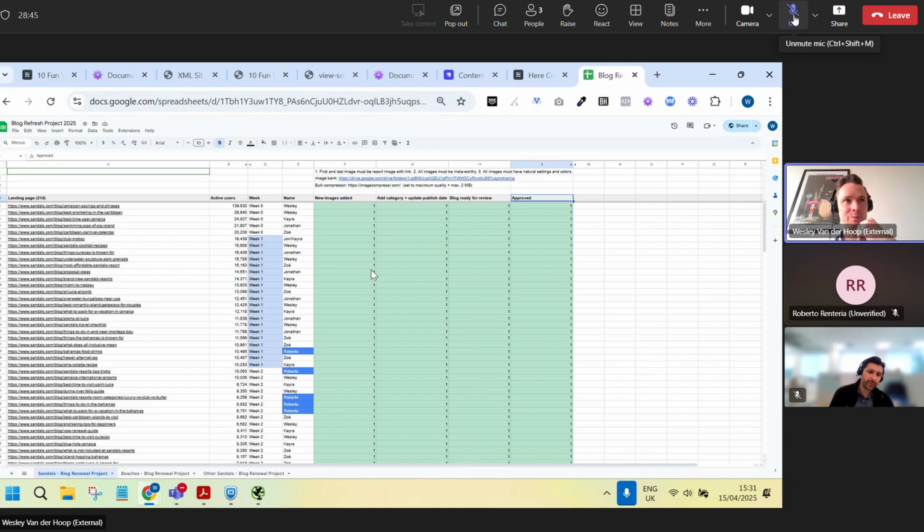It's kind of acceptable, but we can probably do one every half hour. But it's about trying to figure out, can we do this in 2 weeks with not spending more than half a day of work each? If not, then you're going to get back to me and say, I know you want it in 2 weeks, but I think it would take us 8 hours every day of doing this stuff. I think we should spread it out over 3 weeks. That's fine. Then we negotiate and say, let's land this project in 3 weeks, and then you make the timeline based on that.